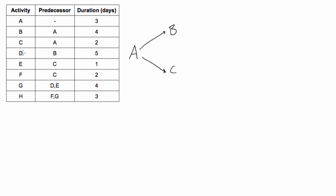Activity D depends on B, so activity D can start when B finishes, so we'll go ahead and we'll draw D depending strictly on B. Now activities E and F both depend on C, so we have activity E and activity F.